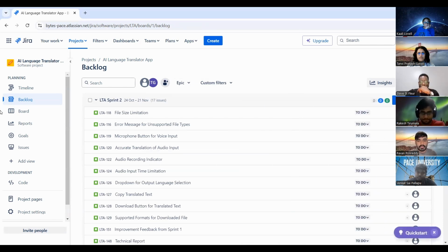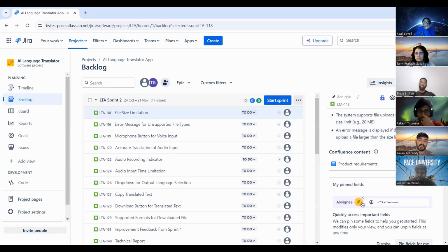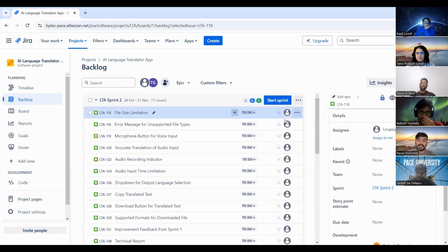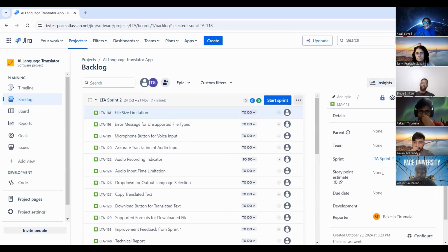All right. Should I start the sprint and then we start assigning now? I think it's better to first estimate the points, because last time, remember, in the velocity chart we didn't get the committed points because the stories didn't have story points when we started the sprint. So let's first assign and point them, and then we'll start the sprint, and the board will be filled with our stories.